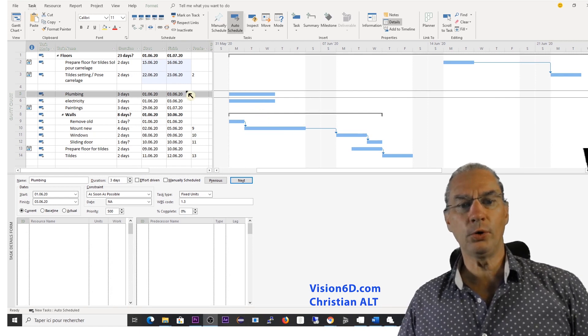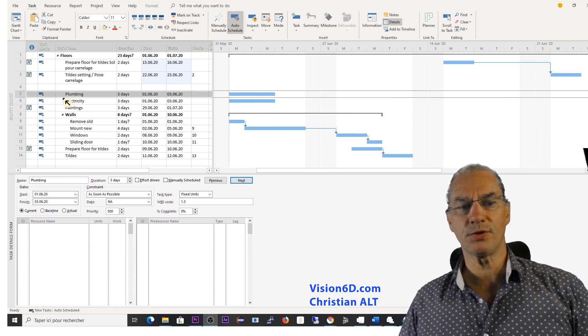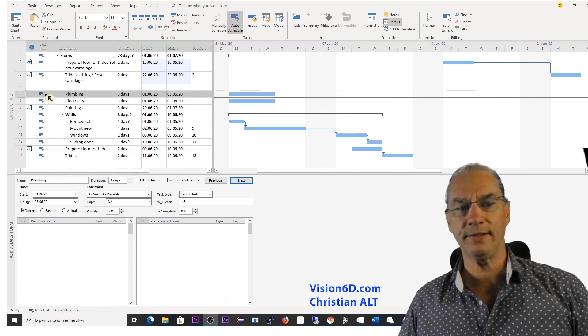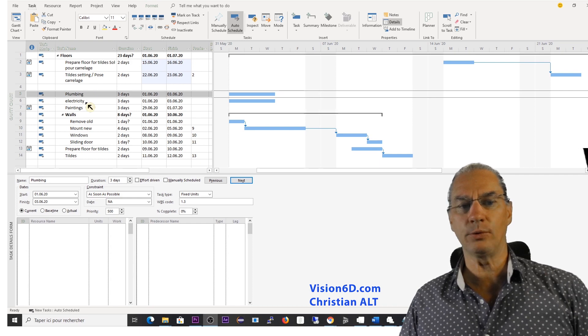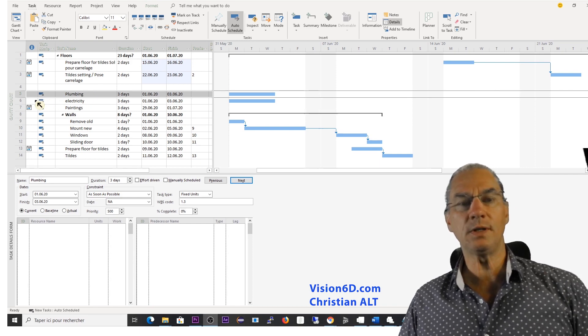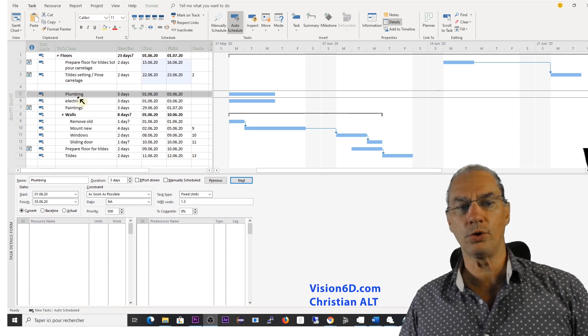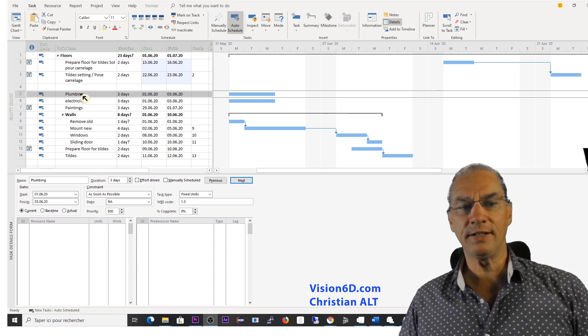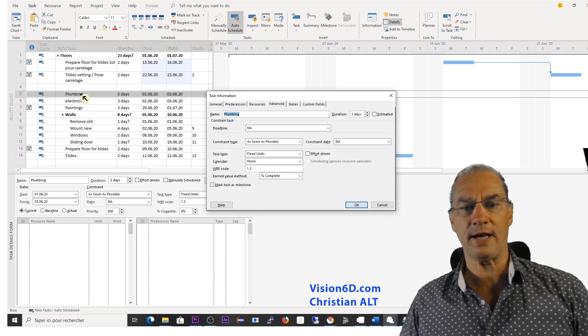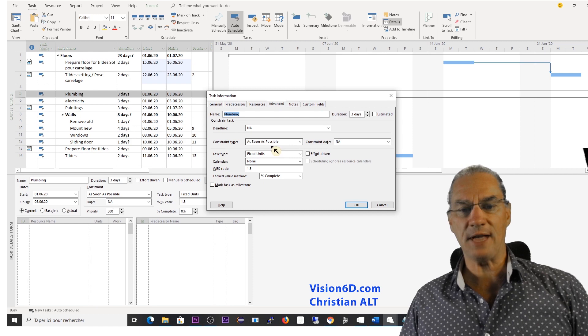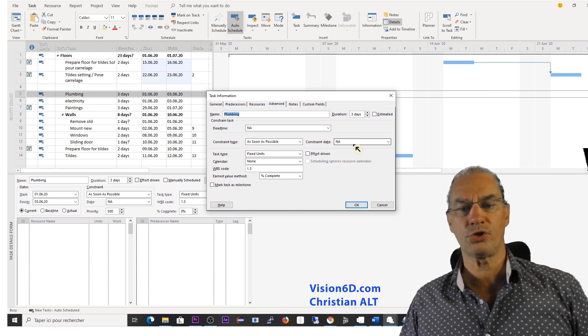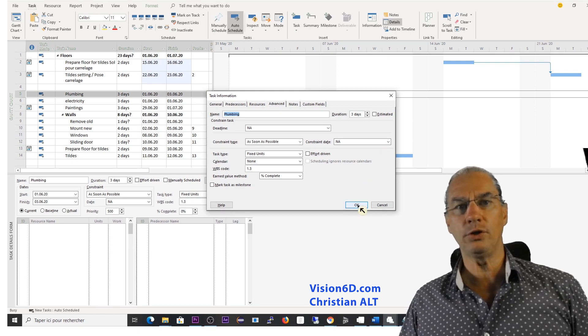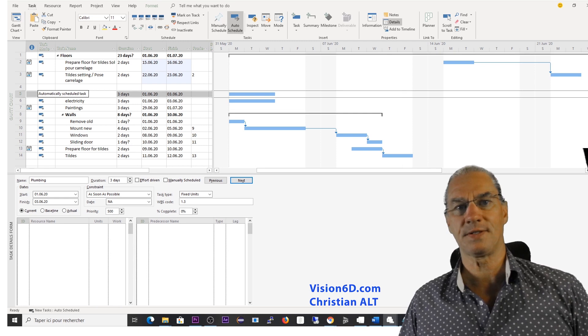When I look at default tasks, how they are inserted, for example, here in the automatic mode, I have two tasks here. One is plumbing and the other one is electricity. We see that we don't have any constraints on those tasks. And if I go into information for that task, we'll see that the constraint type is as soon as possible and there are no constraint date. So this is valid when you have an automatically scheduled task.